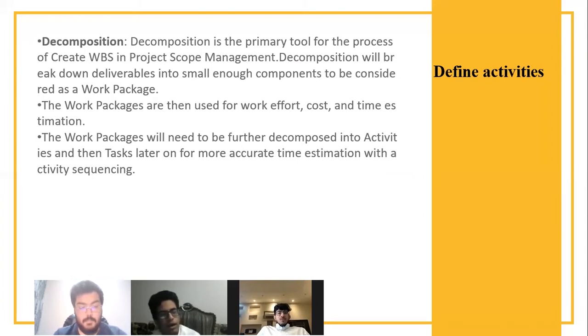The work packages will need to be further decomposed into activities and then tasks later on for more accurate time estimation with activity sequencing. What we are saying here is that we have to break down the work breakdown structure. We need to break it down more until we get to the very small details of how the work is done. Next.